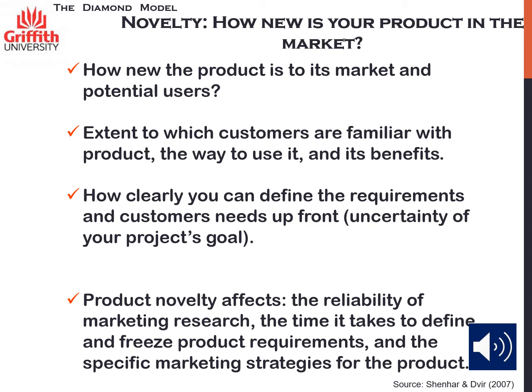This means that novelty affects the development of your project in three ways. First, the reliability of market research. Second, the time it takes to define and freeze product requirements. And finally, the specific market strategies of the product.